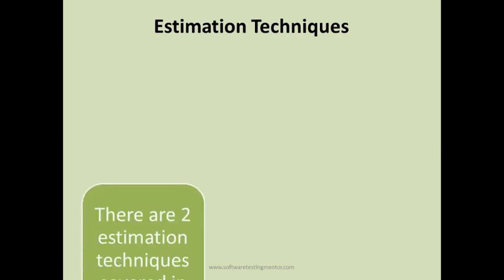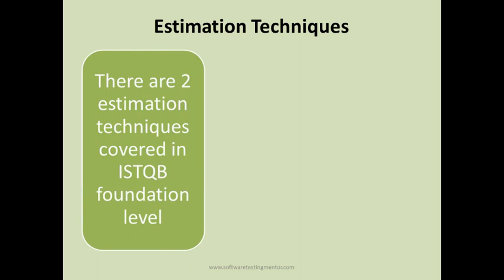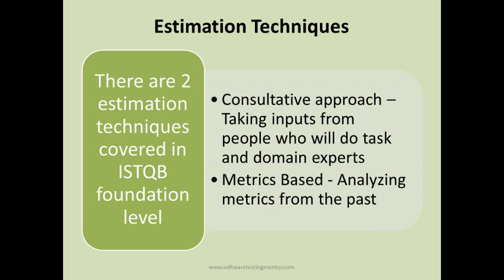Now let's understand some estimation techniques. In the ISTQB Foundation Level syllabus, there are two common techniques to be aware of. The first is the consultative approach, where you take inputs from the people who will do the tasks and from domain or technology experts to estimate the time required. The second is the matrix-based approach, where you analyze metrics from past projects to estimate current project tasks.